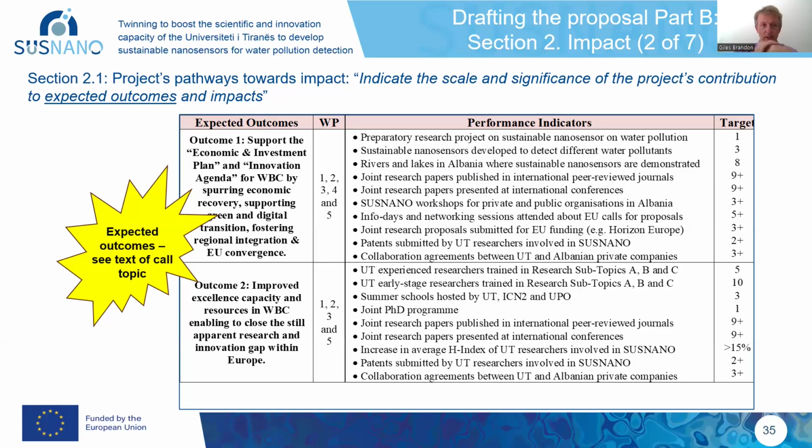For each of those expected outcomes, I then brainstormed amongst all the different activities we were doing, what potentially contributed to which outcome, and could we not only define an indicator, but also put some kind of target? That's what you see in effectively the 3rd column and the 4th column. This is something very good to do. As I say, this is particularly relevant for coordination support actions, especially if you're thinking about ERA Chair proposals, calls under widening. This kind of thing goes down very well.